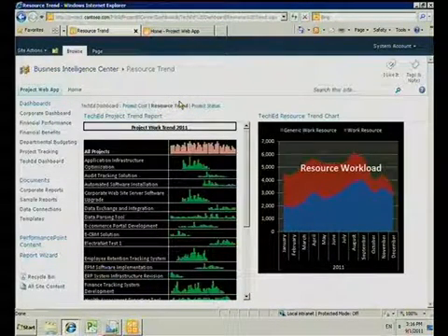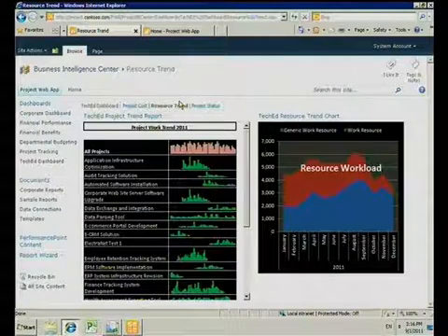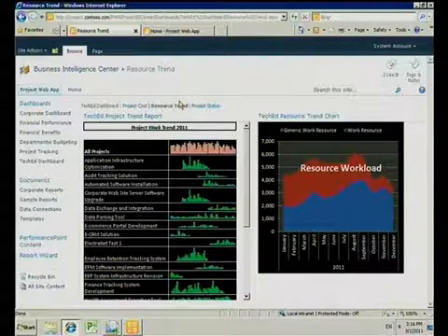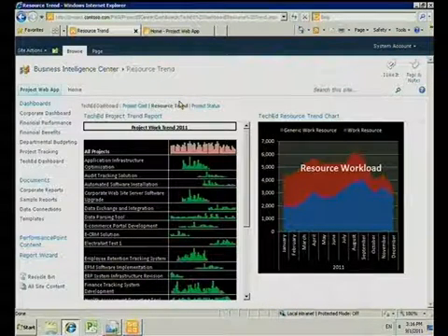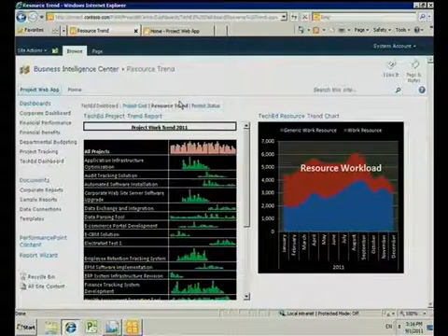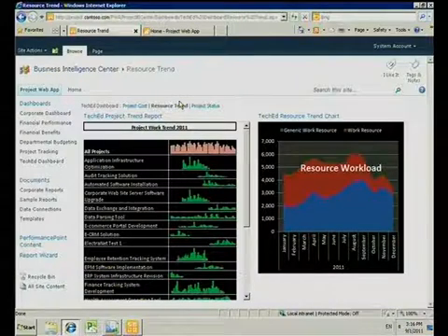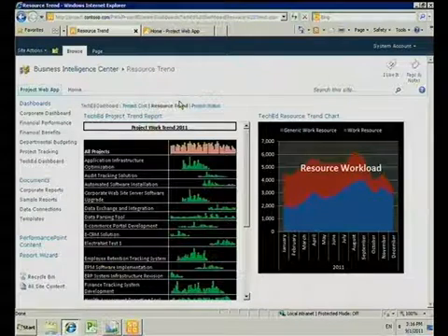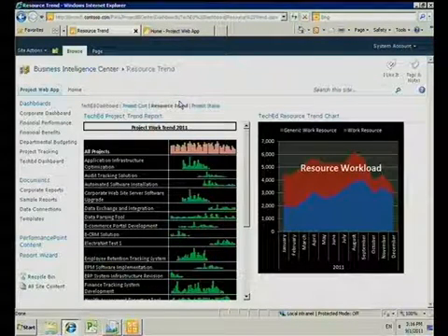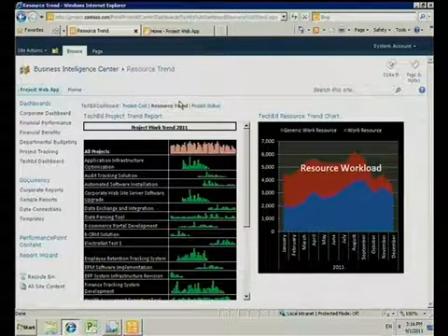So what Project Server allows us to do is literally associate that work that we need to do to resources, and hence I have the ability to outline what kind of workload we have. And that allows me to look at the resource workload, and at the same time it gives me a trend analysis for a particular year where the work for projects actually occurs.